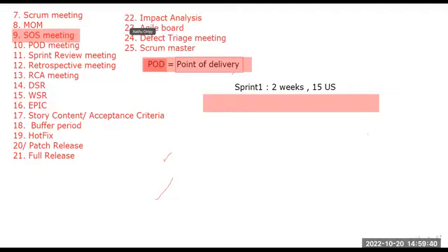If there is a change request, then the new features should be added in the backlog only, na? Yeah, it depends. Let's say that new features we can complete in this sprint, so we can add it into this sprint. Otherwise, we can add into the backlog. Sir, after receiving a change request, will the 2 weeks be extended or what?